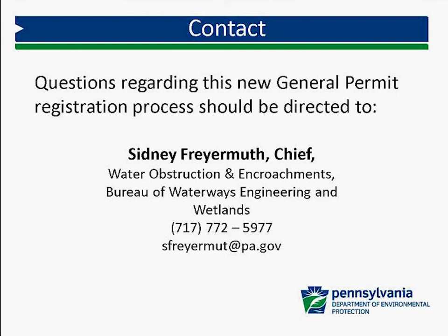Some county conservation districts have been able to review and approve GP 11. That is alarming because they're not authorized to acknowledge GP 11. GP 11 can only be acknowledged by the DEP regional office. Will this change? No.